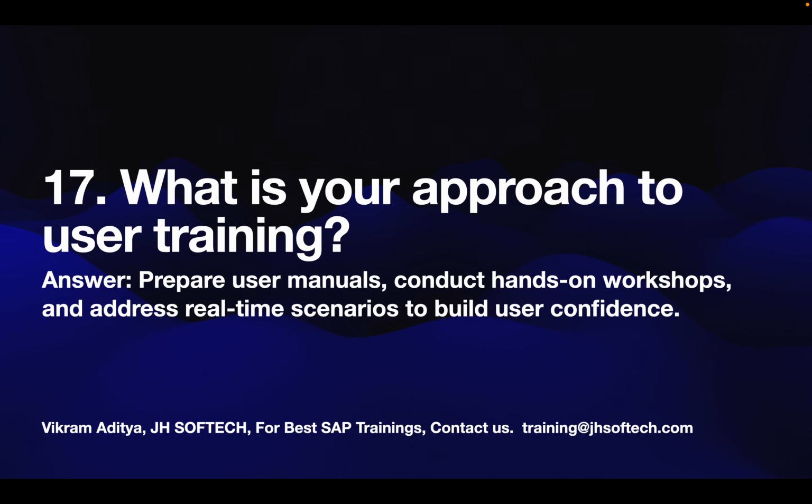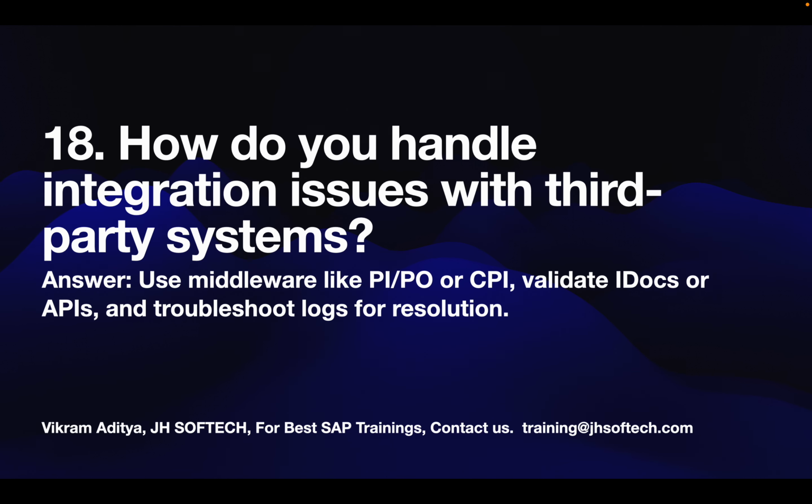Now, what is your approach to user training? Prepare user manuals, conduct hands-on workshops, and address real-time scenarios to build user confidence. Mostly when we train the users, it would be the super users who are already very much aware of SAP, and all we have to do is explain what new developments we have done. The common, standard things they already know. Then the super users will train the end users.